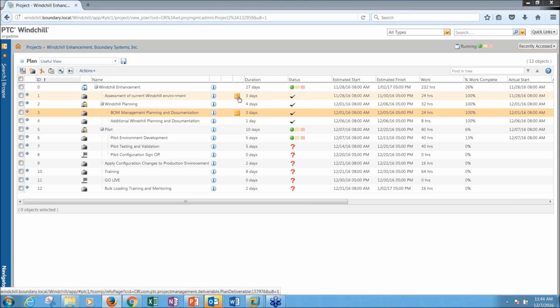So I just showed you we have a location within this project context where I can actually store documents. I can store CAD data in there, any type of file or information that I need. And if that's going to be the completed deliverable for one of these project activities, I can link that through this deliverable. I can see the duration, status, completion percentage of all of these different activities in the project, so I can quickly get an overview of where we're at within this, what's happening currently and what needs to happen next.